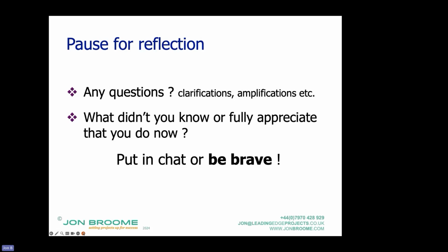So it would vary depending on two things. One is if it's a design and build job and the contractor is doing the design, then it could only be a compensation event under 60.112, which is the compensation event for physical conditions. So there, there is subjectivity in the words. Would it be a physical condition which an experienced contractor at the subcontract date would have judged to have such a small chance of occurring that it would have been unreasonable for them to have allowed for it? So there's subjectivity in those words.